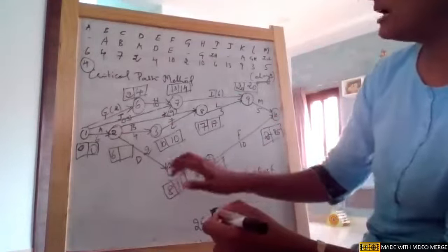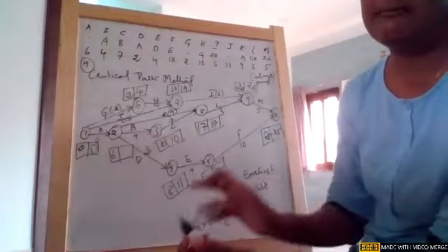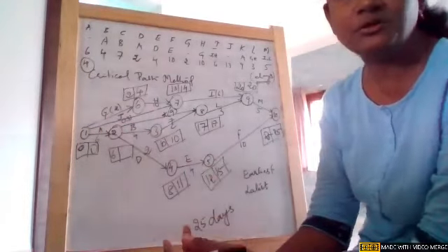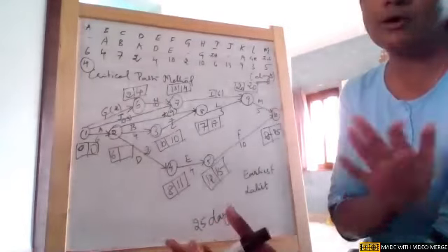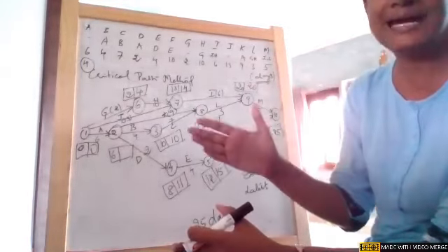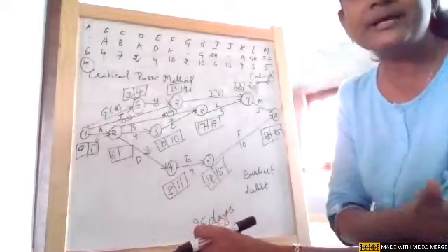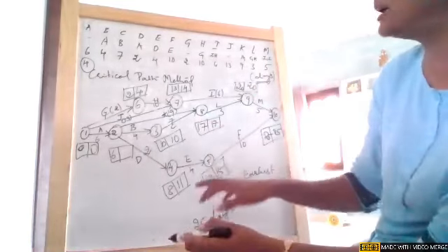So this is how. Now see girls, when it is a head, we took the maximum value. When it is a tail, we need to pick the minimum value. Simple, the exact opposite of it. When it is a head, we are adding them. When it is a tail, we are subtracting them. So that is how they are complete opposites.